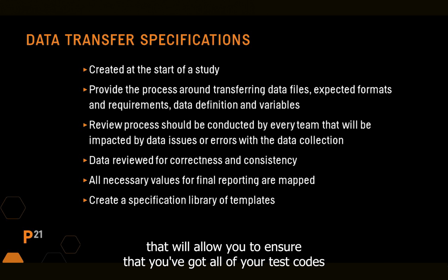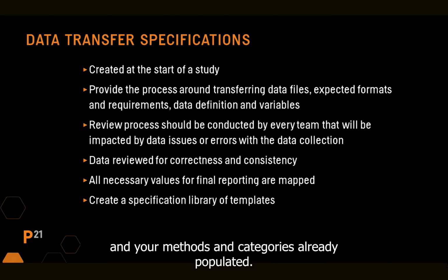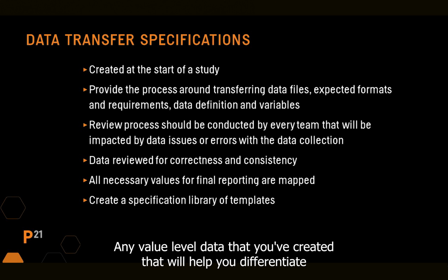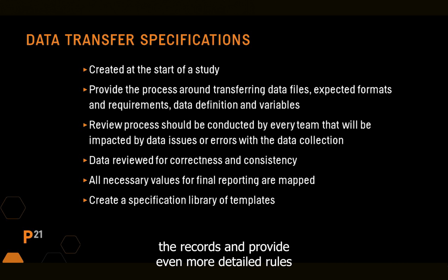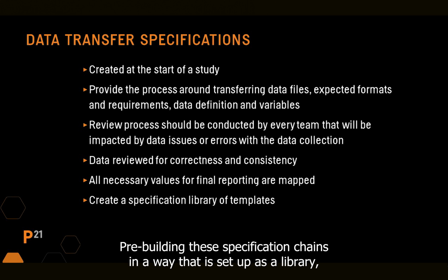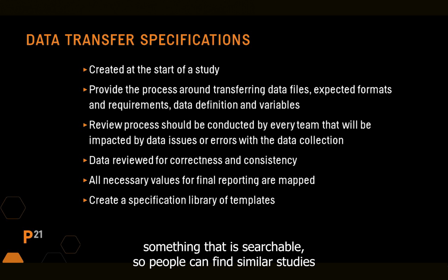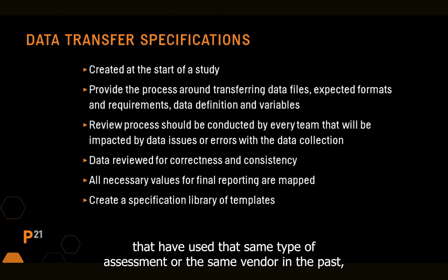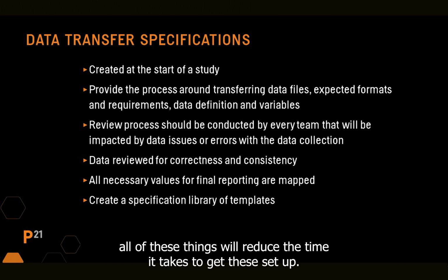That will allow you to ensure that you've got all of your test codes, methods and categories already populated, along with any value level data that you've created that will help you differentiate the records and provide even more detailed rules about how you expect that data to be received. Pre-build these specifications in a way that is set up as a library, something searchable so people can find similar studies that have used the same type of assessment or the same vendor in the past. All of these things will reduce the time it takes to get these set up.